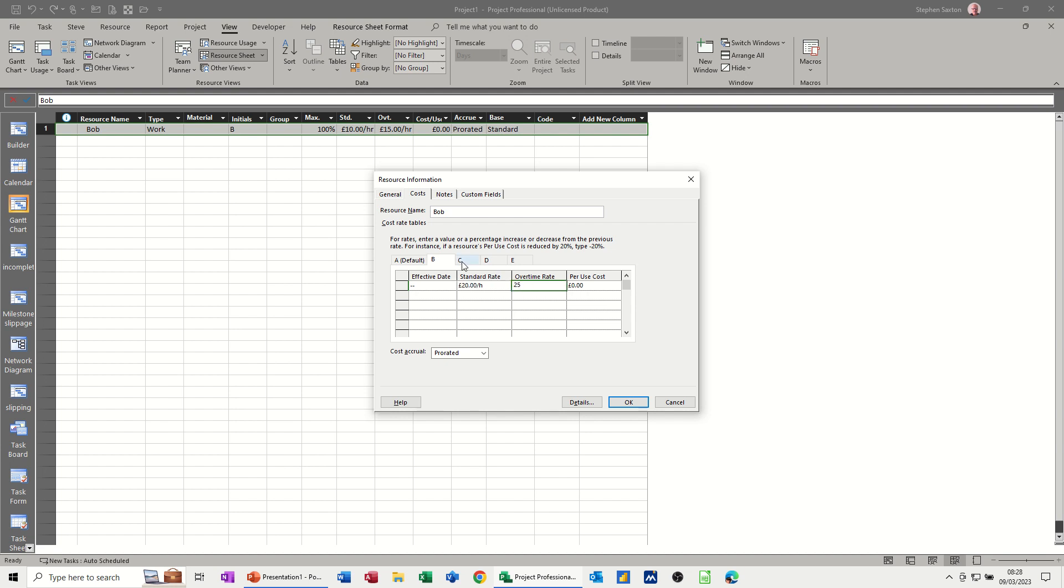And then if I use cost C while I'm here, I might want to use a fixed cost for internal training maybe. So internal training is £150. So for internal training, that's £150.